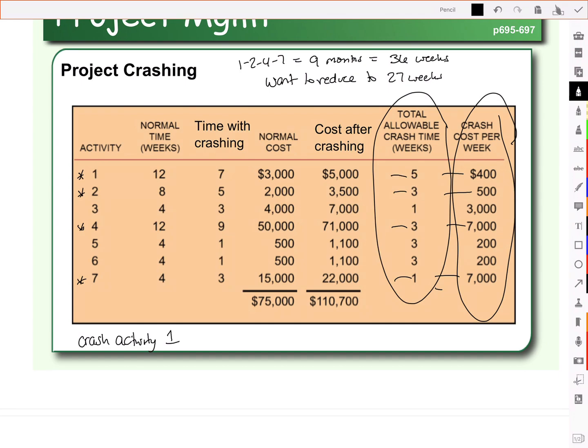You're building this house. The customer comes to you and says, I can't wait 36 weeks. How much would it cost me to get in it early? How about 27 weeks? So we say, okay, we can speed this process up, but it will cost you. So the question is, how much should we charge them to crash the project?